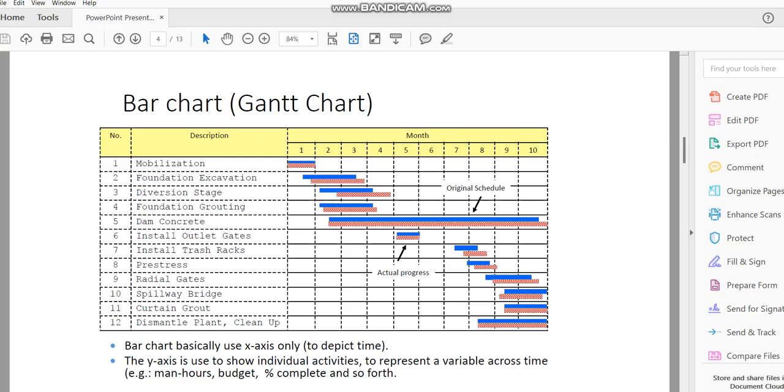Okay. So tracking Gantt is like adding another line under the activity. Okay. Under the original Gantt chart. So it's depicted usually by a dotted or some form of line, kind of a broken bar or something like that. It's not a smooth bar. This is what we will usually do with tracking Gantt. And Microsoft Project will have tracking Gantt as long as you key in the activity's amount of completion, how many percent, and it will automatically generate it for you. Okay. But you need to calculate that percentage of completion first.